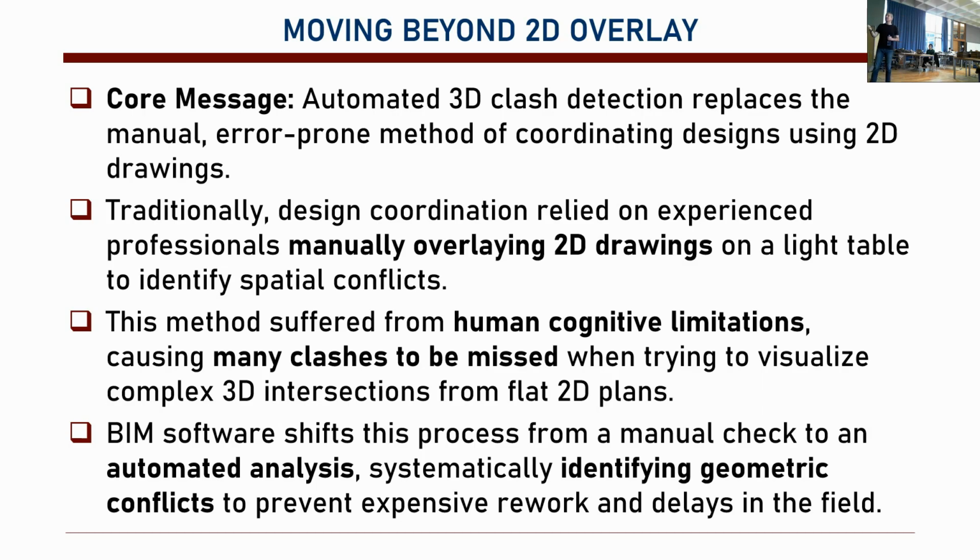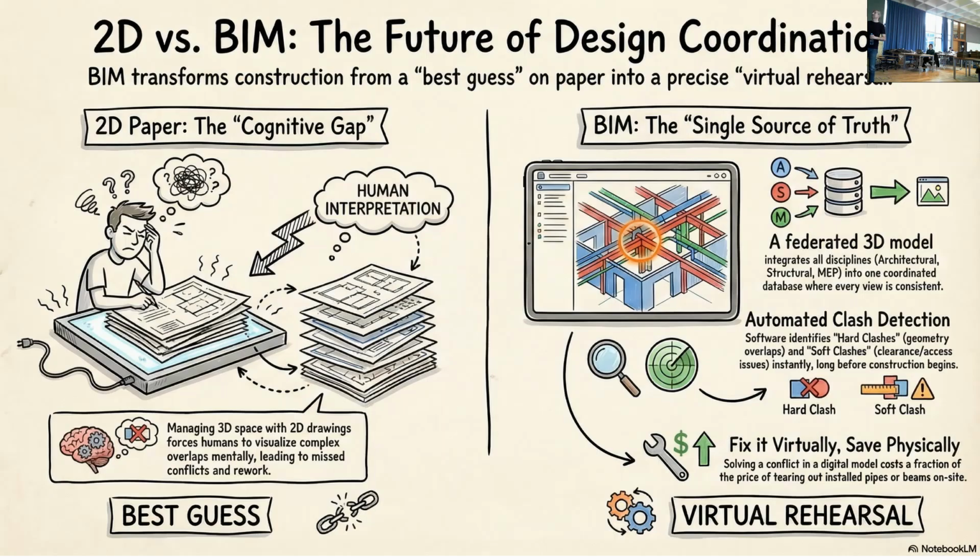And we can prevent them. Why do we need that? Well, we want to know at the very early stages of the project so that we can fix the project. Because if you don't fix the project, when it goes to the construction site, changes are expensive. They cost money. Like bringing down a wall that is already constructed, it's painful, it costs money, and you don't want that. It happened to me, so that's how I know.